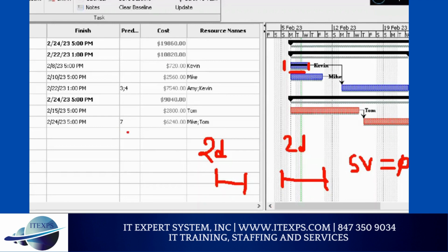But now listen carefully. You planned 2 days, but actually you took 4 days. What does it mean? You took extra 2 days. So schedule variance will be now minus. So anytime schedule variance is minus, is it good thing or bad thing? Bad thing, means we are now delayed. So if you get one message tonight from me: variance, positive is good, negative is bad. Speak with me. Positive is good, negative is bad.